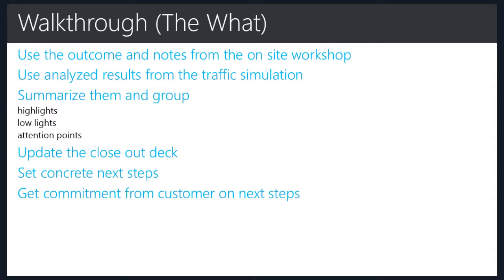There's a closeout deck template provided. You must update it and present this to the customer, and we must set concrete next steps to which the customer makes a commitment. These next steps are vital for a high quality Skype for Business deployment. So your customer must commit and set a date by when they will complete these next steps.